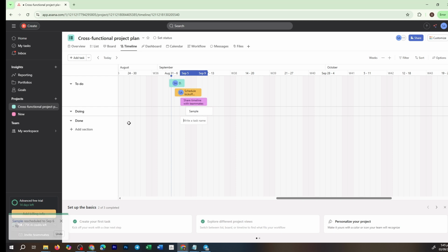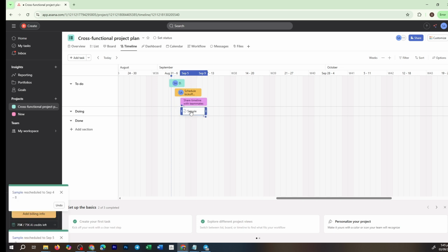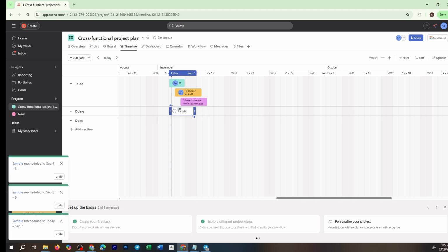You can do this by clicking on a task and dragging the dependency line to connect it with the preceding task it relies on. This setup allows you to clearly see which tasks must be completed first and helps you keep your timeline realistic. When working with multiple projects, aiming for a truly consolidated master timeline is beneficial.